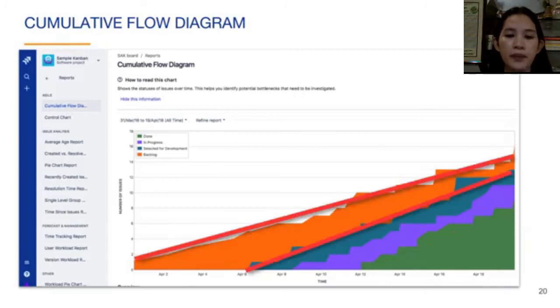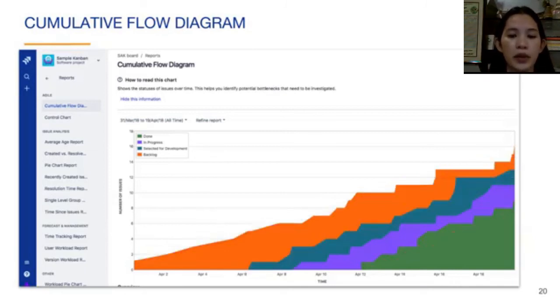You can see many important Kanban-related things from a cumulative flow diagram, including bottlenecks in the process, overall flow improvement, and how well the team is keeping up with the backlog. You can't really see individual issue problems with the diagram. You can use other reports or reviews to focus on specific issues.